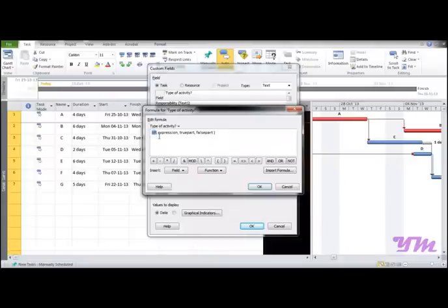It uses double if. Okay, now we can select the expression part, and here we don't need to type. We can also type, but the easier way is to select the field directly, whichever you want. So suppose, as per our case, we want to test that if total slack equals 0, then critical activity, or else non-critical activity.